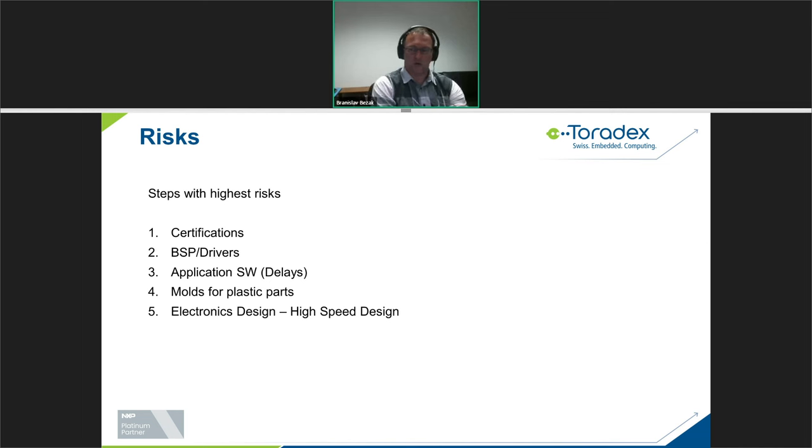So basically, I wanted to talk about what your highest risks are. If you are a product or project manager, where is the risky part? Well, certifications, I would say, is the highest risk part, because if you need to redo it, you will need to analyze it, figure it out, make new prototypes, and go again to the lab. That takes quite a lot of time, so that can really derail your project.